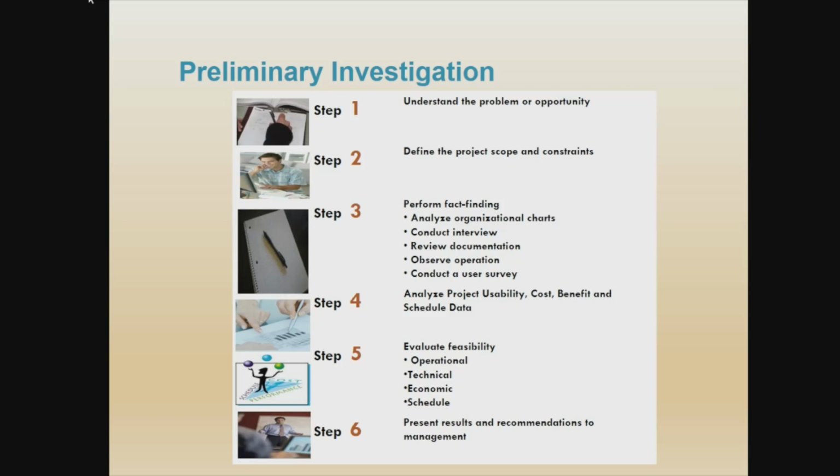Number 5, evaluate the feasibility. Conduct the feasibility studies in terms of the operational, the technical, the economic, and the schedule. Step number 6, present the results and recommendation to the management. So based on that, you can make a suggestion, make a recommendation.